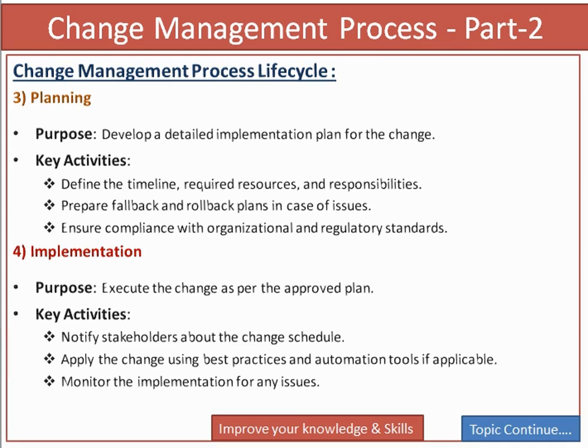In the implementation, purpose: execute the change as per the approved plan. Key activities: notify stakeholder about the change schedule, apply the change using best practices and automation tool if applicable, monitor the implementation for any issues.